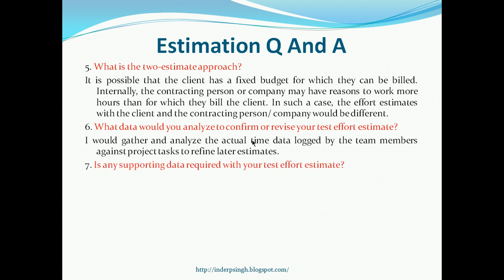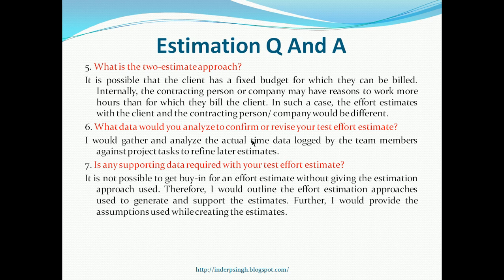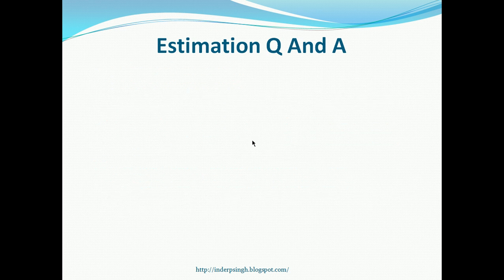Next, is there any supporting data required with your test effort estimate? Absolutely. Because it is not possible to get buy-in for an effort estimate without giving the estimation approach. The moment you submit your test effort estimate to your management or the client, they are going to ask you what approach you have used. So not only should you have the approach available to explain to them, but also you should have the supporting data, and also you can submit what assumptions you have used while creating your estimates.